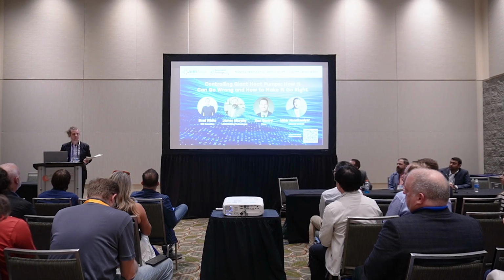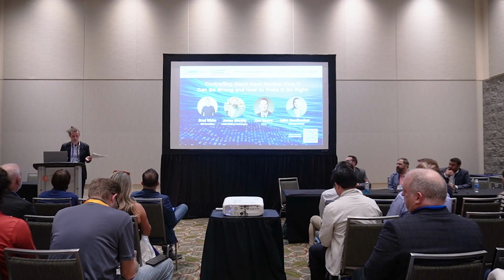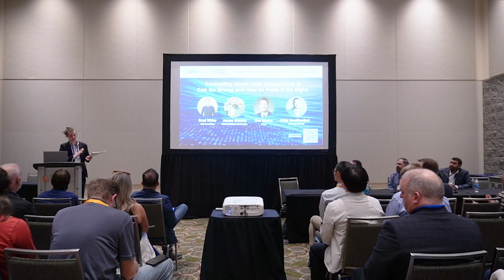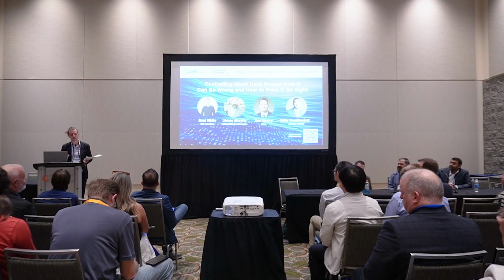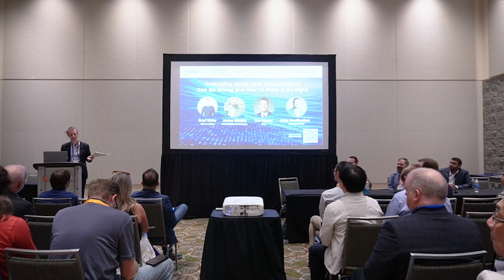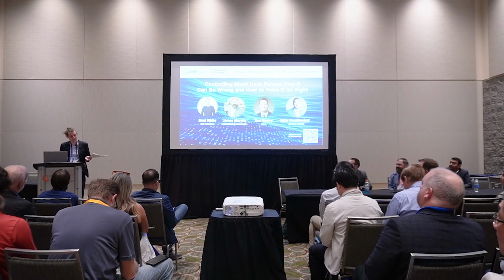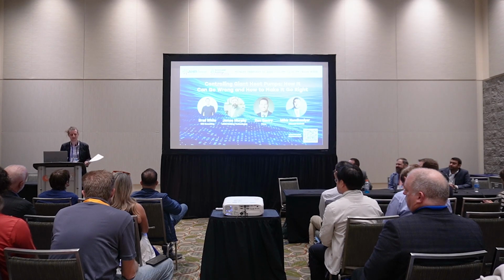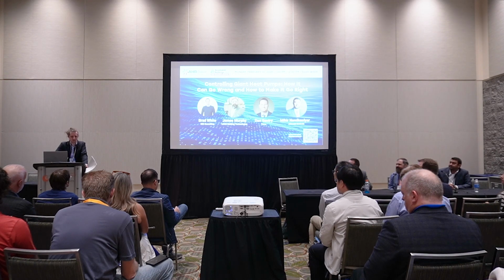Startup tech shows up, sets it to 115. Okay, sorry, we need 125. He's like, no, we don't. The unit actually doesn't like 125. We really recommend you don't push it past 115. So this is the first time that information had been communicated to us, now that the equipment's actually on site. And so, okay, now we've got to figure out how to deal with this situation.